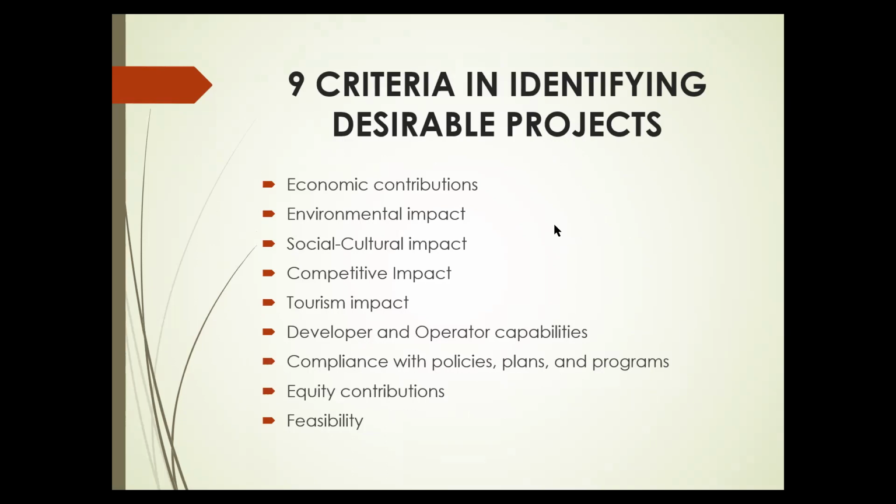So in here, the government agency will check if the project creates a significant level of income and employment benefits. Another criteria is the environmental impact. So the government should check if the project is developed in compliance with existing legislation and regulations governing the conservation and protection of the environment. The third one is the social or cultural impact. So the project does not jeopardize the social well-being of the citizens.